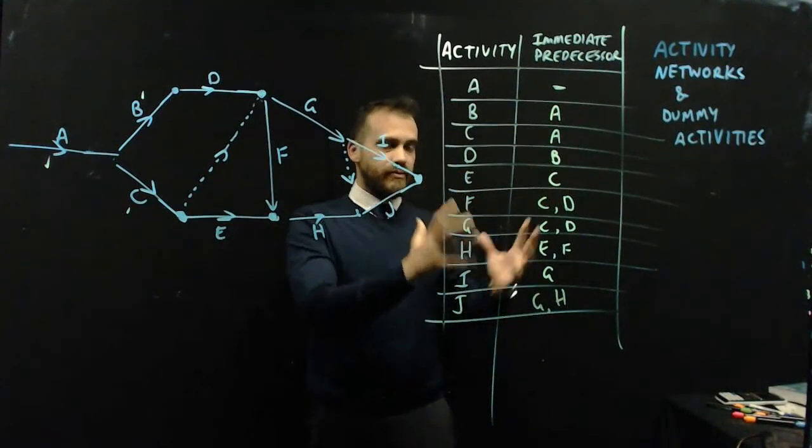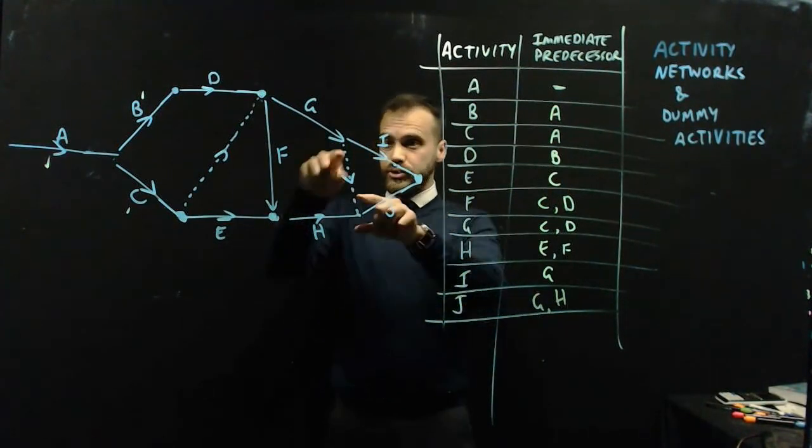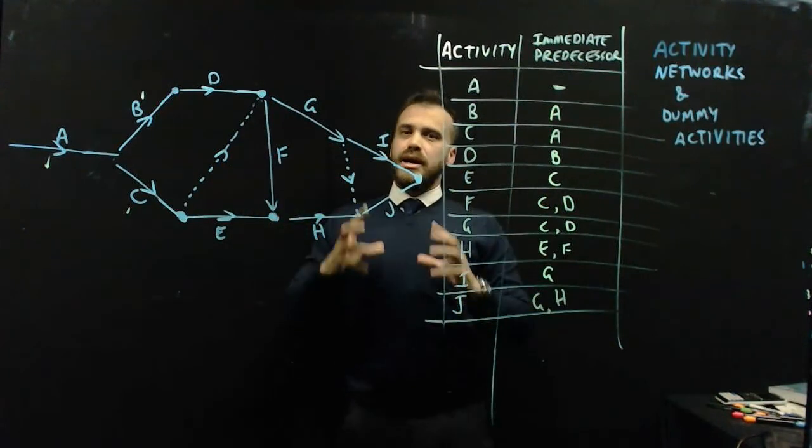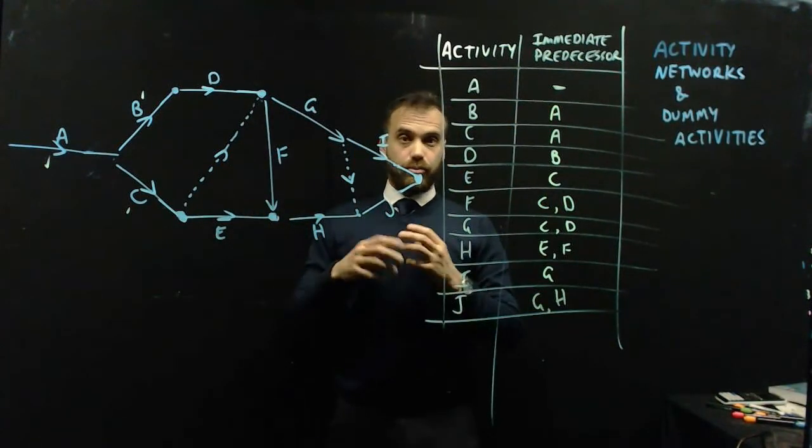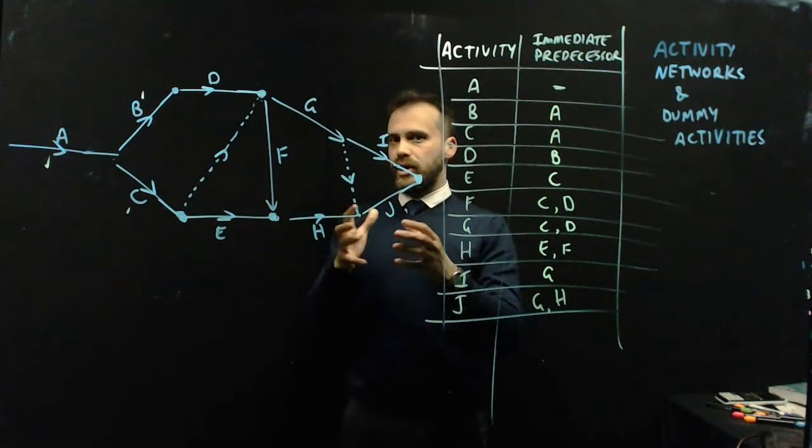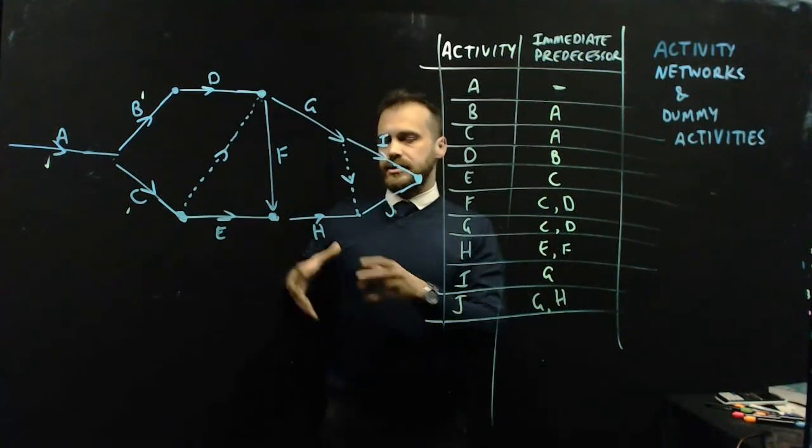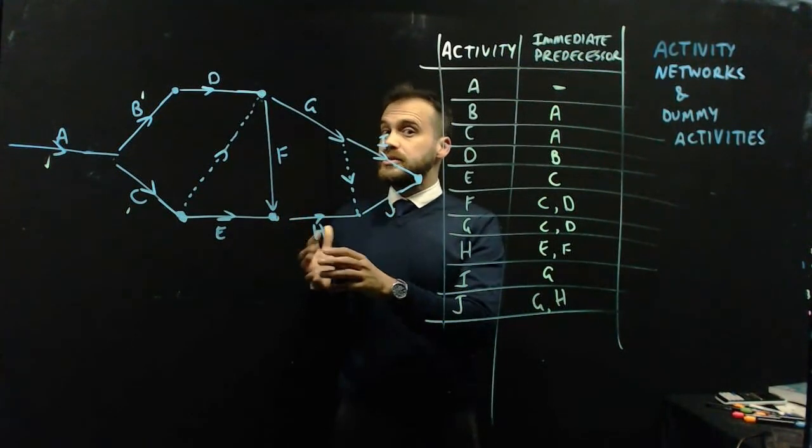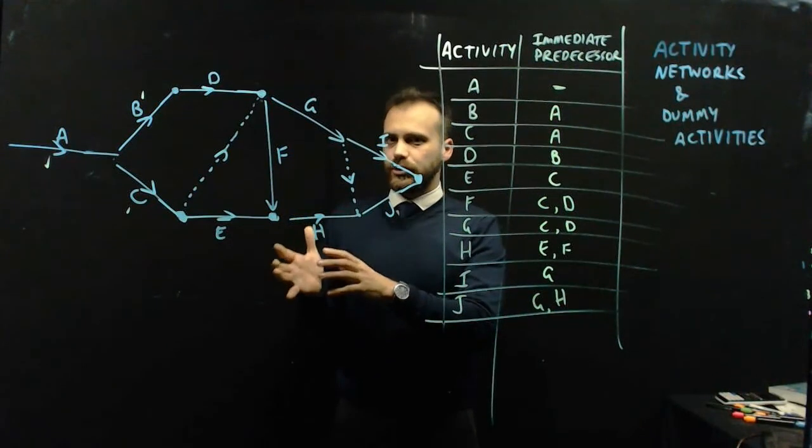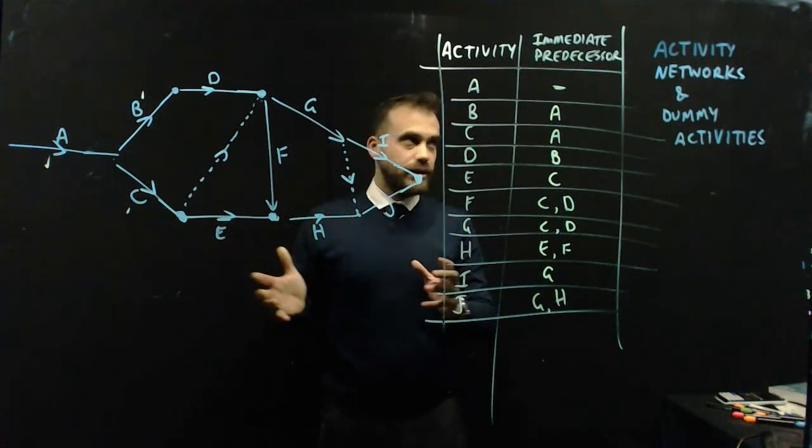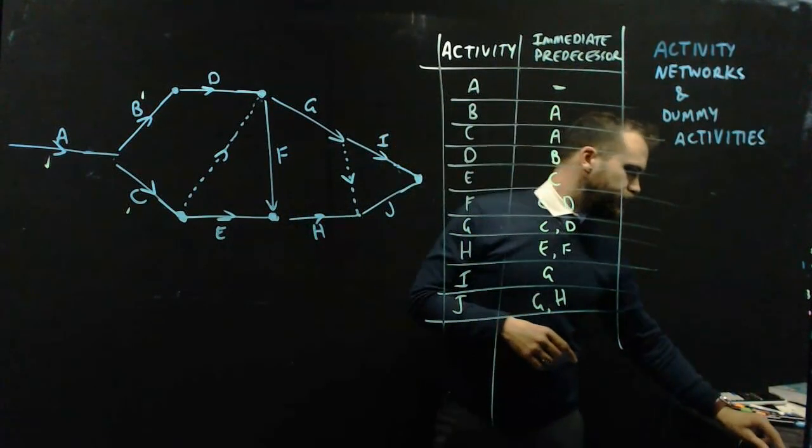Those are activity networks. Those are dummy activities. And we use them when the problem is that an activity has some immediate predecessors in common but not all immediate predecessors in common. Done.